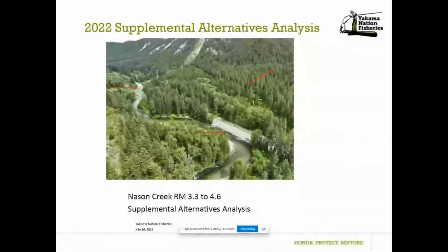The project is likely to receive much attention, and we knew from past examples that it will require a rigorous process to move it forward. We also understood that funding this project would still be the largest hurdle to get over. In the spring of 2022, the Yakima Nation adopted Chelan County's Natural Resource Department's 2011 Alternatives Analysis and 2012's Feasibility Study, while incorporating both the Yakima Nation's concepts road realignment option and the large wood into these studies. The Supplemental Alternatives Analysis document reevaluates all alternatives and costs and specs that are associated with each alternative.